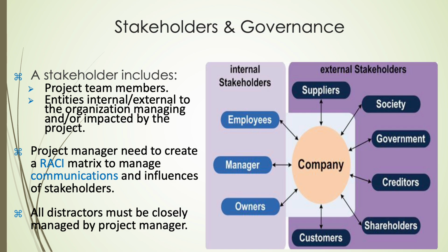Effective stakeholder management is fundamental to project success, particularly when corporate social responsibility (CSR) goals are in scope. Using a power interest grid, stakeholders are categorized and engaged accordingly. Influential but less interested groups like executives are kept satisfied, highly interested and powerful groups such as customers are actively managed, while operational teams are kept informed and developers are monitored with minimal effort.